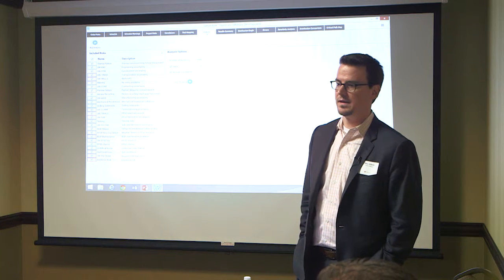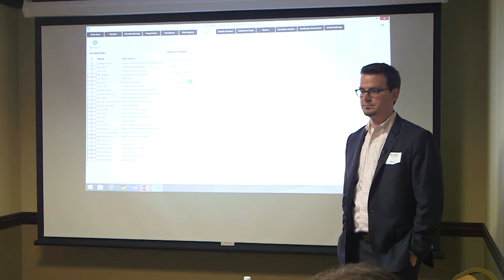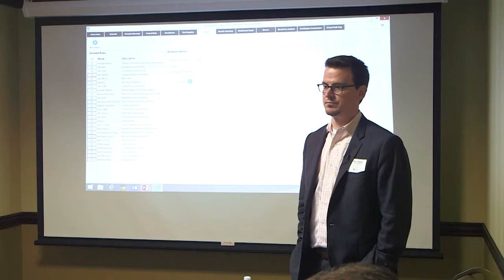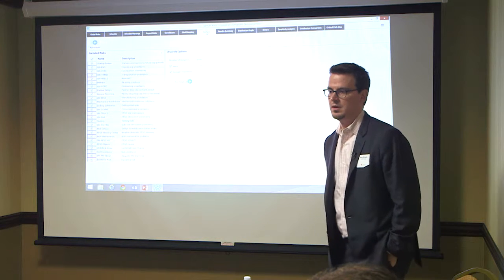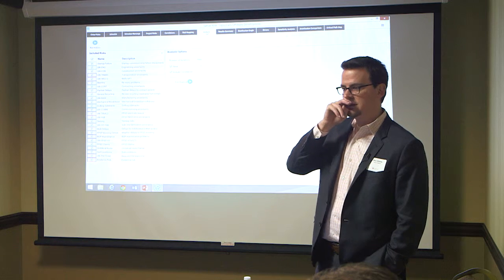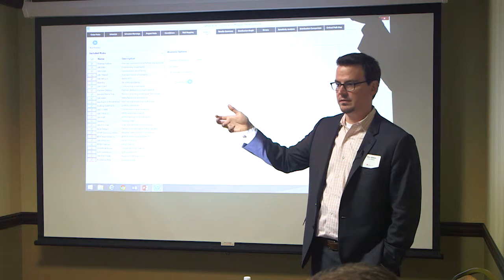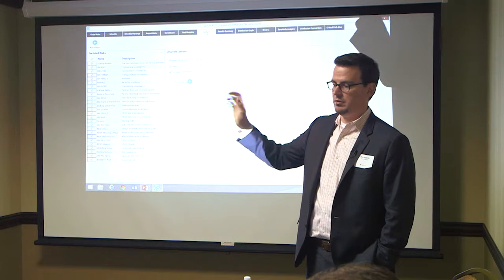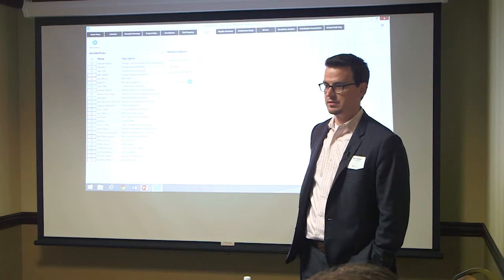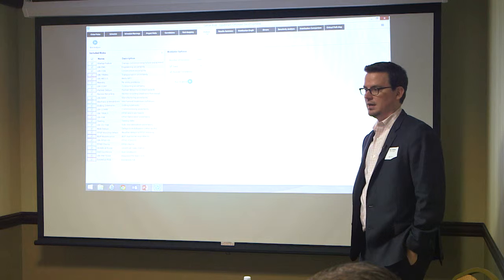Something similar when we import a schedule in: if you have it in days and you wanted it in minutes, do you have to change your P6 format to be able to import and manipulate the time in this one? When you scale up and down on time here, is the schedule still good? Yeah, when we bring it in, one of the import options is what's the lowest duration you want to bring it in as, so you can bring it in as hours or minutes. You set it at that point, and then you can change your display view inside the application. That's what PRA is not good about. It's always a challenge; you have to reset up the project file to get what you want.